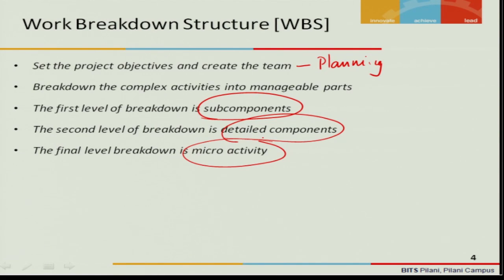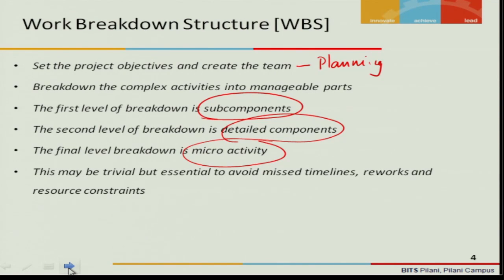And when we miss an activity, we miss the time component of that as well, which will not be plugged into the project. So ultimately, the project estimated time will be shorter than what it has to be actually. This may be trivial, but essential to avoid missed timelines, reworks, and resource constraints. So to the extent possible, we should get into the micro activity level.